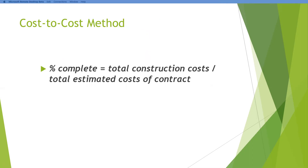I want you guys to maybe write down this formula or take a picture of this. This is the basic formula we're going to be talking about — how to figure our percentage of completion on a job. And that is: percent complete equals total actual construction costs divided by total estimated costs.